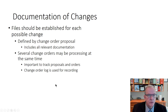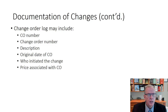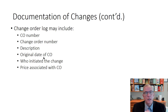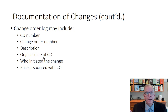We really need to document our changes. We want to have a change order log with a numbering system so we can track them — see their status, what their estimated costs were, and what the actuals were. It should include a CO number, description, and date. If we're waiting for it to be approved, we should put a time limit on the cost for it, because what we priced today might not be the same in a month. You want to be clear on the change order proposal that you expect it to be accepted by a certain date, and if it's beyond that date, the costing will be different.